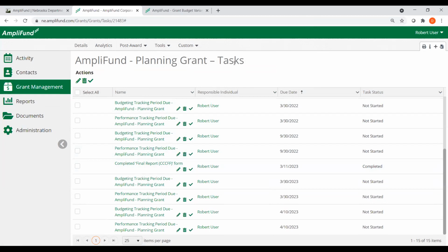So in terms of all of the actions that we wanted to go through here in the system, we talked about entering in expenses, submitting your reporting periods, and submitting your reimbursement request when you're ready to close out your project. And again, submitting that reimbursement request for half of the grant funds that you've not already received in your advance payment. Then we went into the post-award and the performance plan, answered the 2 questions that need to be answered, submitted those reporting periods, and then submitted our final report form, all the while through each step marking tasks as complete to indicate that we've completed them.